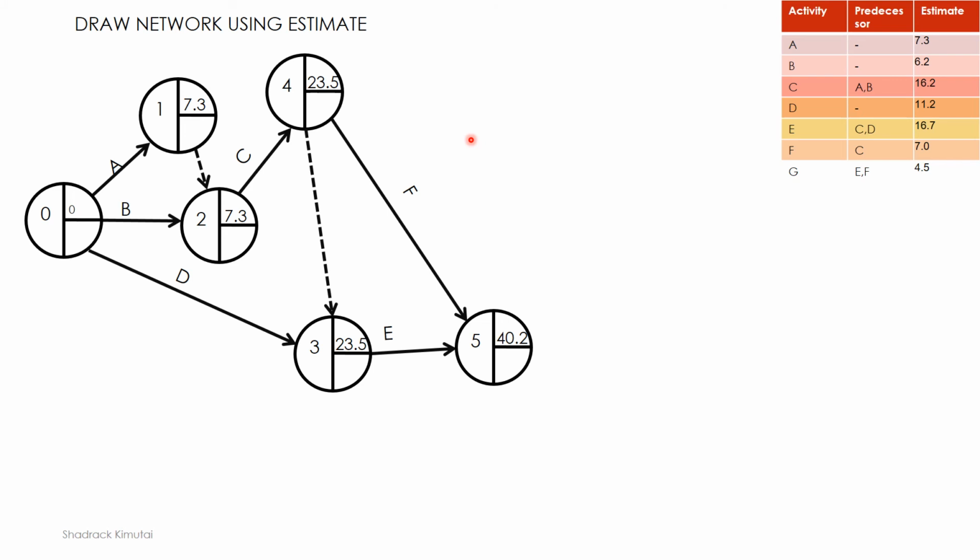So to resolve this kind of problem, we have C terminating in its own head event, which is numbered now 4. We'll restructure the numbering. Then using a dummy, we'll bring C and combine it with D to get activity E. And from that, we'll also have C generate F on its own, as shown.